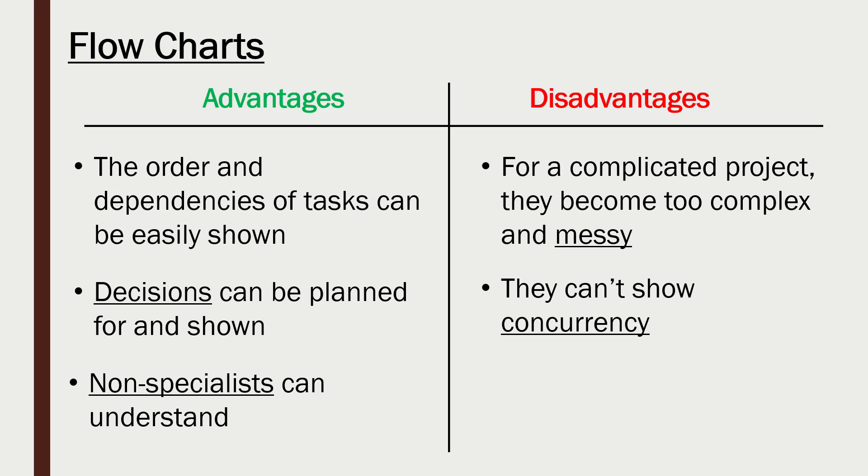They also are designed to be sequential, so one task after another, which means they don't show concurrency. There is no good way or proper way to show tasks done in parallel, which is not very realistic, because most projects will have some parallel aspect to them, some concurrent aspect.